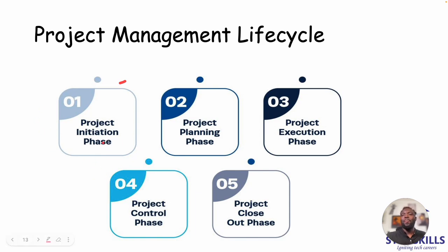Now, in a business context, it is important to look through that business case that justifies why you should be doing this project, or a project charter that formalizes or authorizes a project, right? A project charter is that document that authorizes a project. The project sponsor will hand over a project charter to the project manager.